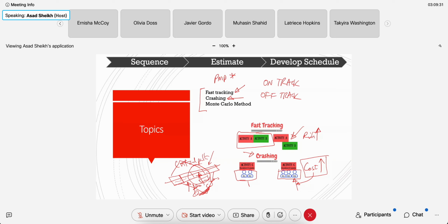So it'd be okay if the non-critical path items are pushed back, as long as it doesn't affect the critical path. Yeah, what you could do is take a resource which is right here and say, hey, why don't you join this guy here and leave what you're doing because it's not on the critical path. And then you can move this resource and join this one and crash the project by removing this one here. You will lose something here, but because it's not on the critical path, the house is not going to fall or crash or get destroyed because the pillar